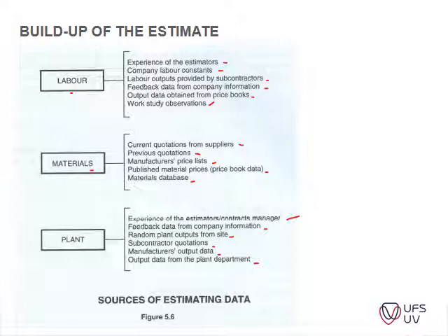Obviously, you will need to take into account, you might need some labor to clear out the excavations and clean and level it. Is that excavated material staying on site? Is it stockpiled? Is it carted away? That type of thing has to be taken into account.